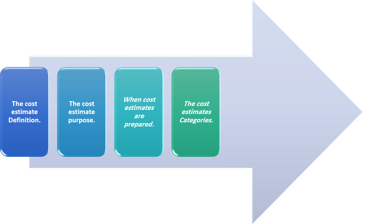Point four — cost estimate categories: cost estimates are divided mainly into three major categories. One: conceptual cost estimates, elaborated using incomplete project documentation. Two: semi-detailed cost estimates, developed when a project has been partially designed. Three: detailed cost estimates, based on fully developed construction drawings and specifications.